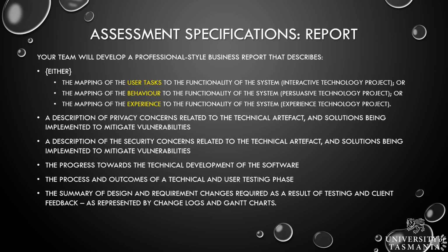So we will introduce you to change logs, and that will necessitate the updating of anything like a Gantt chart to show the impact on schedules and milestones throughout the rest of this semester. So now we're being a little bit more rigorous about the kinds of project management mechanisms we use to communicate changes, and changes to either design requirements or milestones.